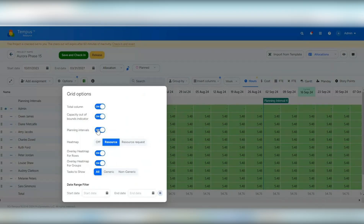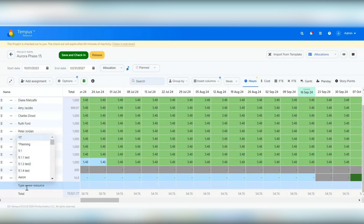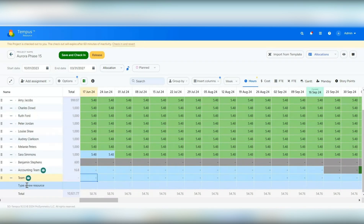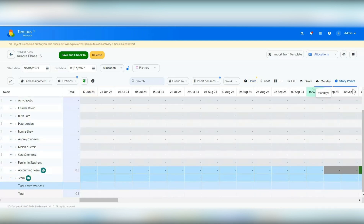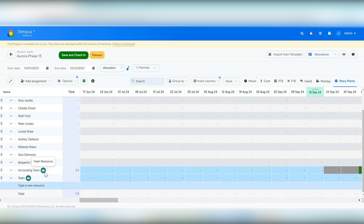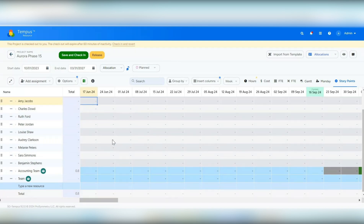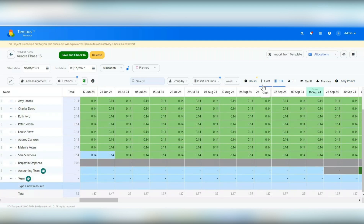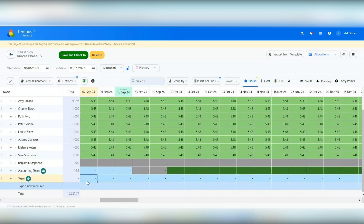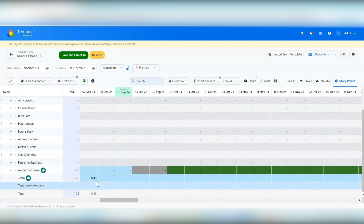Now let's allocate the team resource I just created. If I click on the team resource, you can now allocate in hours, cost, FTE, FTE percentage, Gantt, mandates, and story points. Story points is new and can be hidden or shown based on general settings as active or default units. When on story points, only team resources assigned to the project can have story points entered — individual resources will be grayed out. Story points are also calculated automatically if you put in hours, FTE, or cost. For example, entering 10 hours and switching to story points shows an automatically calculated value based on the team capacity setup.